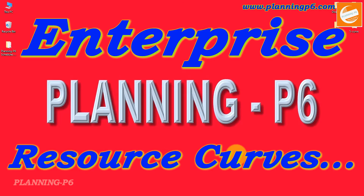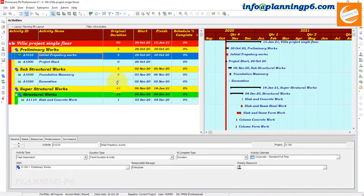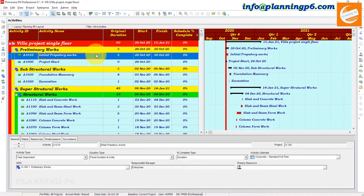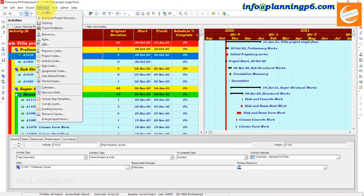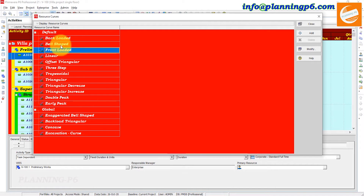Let's open where this feature or option is located in Primavera P6. Open your Primavera P6, go to Enterprise, and the last option is Resource Curves — open it. Resource curves are used to model the resource or cost distribution of an activity within the project schedule.